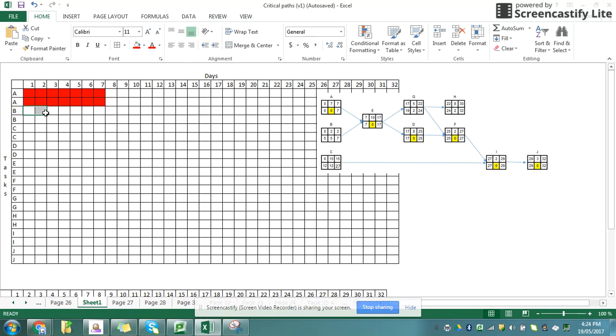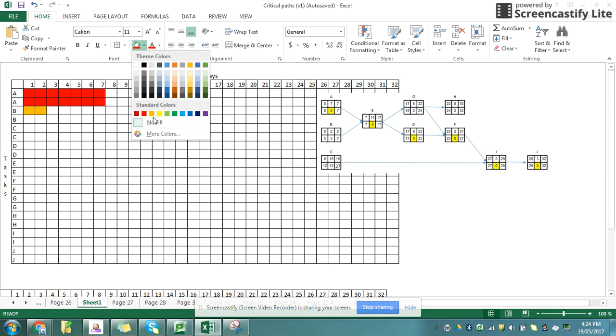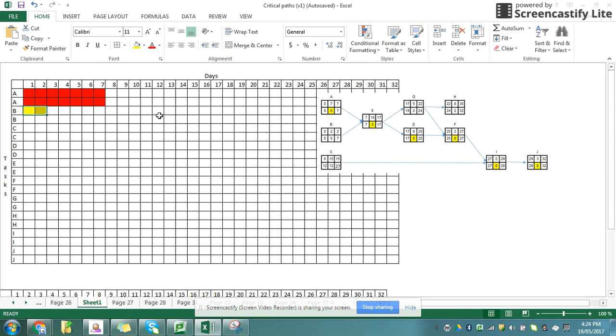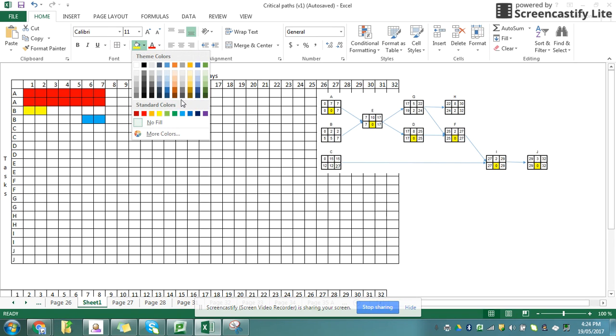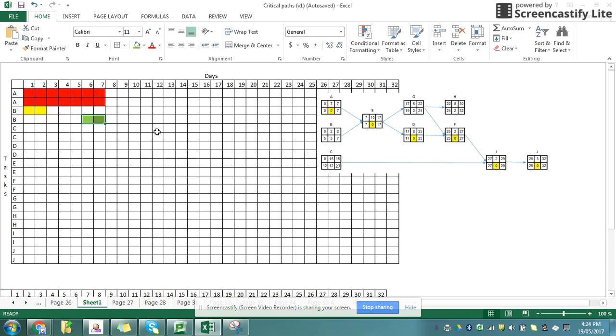So I'm going to do that with all of my tasks. So the first one, I'm going to go from 0 to 2. Because it's not a critical path, I'm going to do the earliest time in yellow and I'm going to do the latest time in green. So it starts after 5 and finishes by 7.